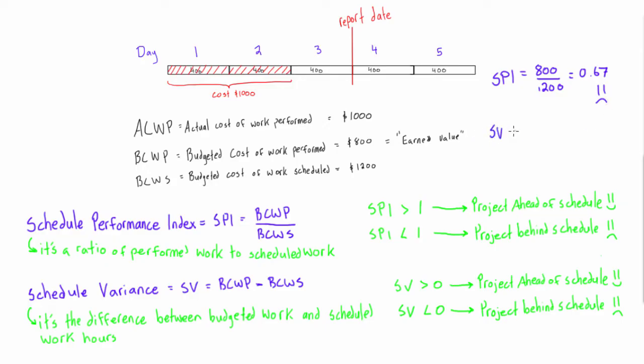Schedule variance - this is the other way to check. We have BCWP minus BCWS, so we'd have 800 minus 1200. This is going to give us a value of negative 400.